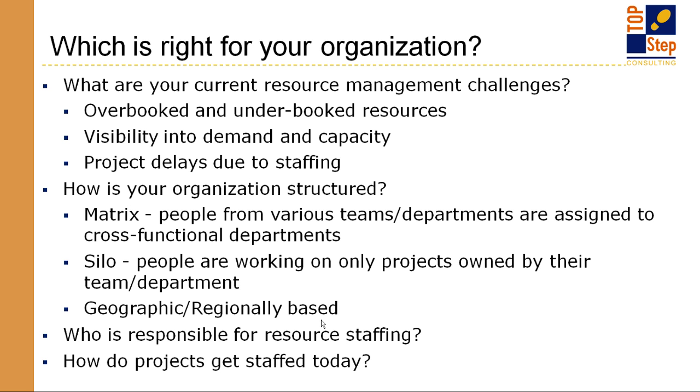Also, another thing to consider is your structure. So if you have resources that are shared cross-functionally, sometimes that lends itself better to a centralized process, so you can have someone that leverages resources across, understands skills, and so forth. In a decentralized process, it can be a little bit easier to manage siloed resources. For example, let's say your organization has a security practice, and the resources in that practice are only used for security projects. Well, that makes it a bit easier to manage those resources.